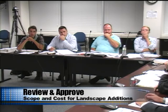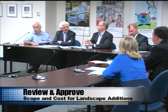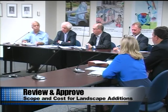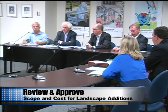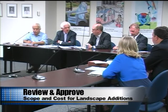Right. Hydro seeding's a different story. I'd have to look into the latest they could do it. If it wasn't hydro seeding, it could be a fibrous mat or something like that. We can solve the problem of stabilizing the bioswale, I think, at a lot less than landscaping it. You want to put the topsoil in there anyway. What I'm hearing is, there's too much risk on the table to take a $37,000 or $38,000 bite at this.